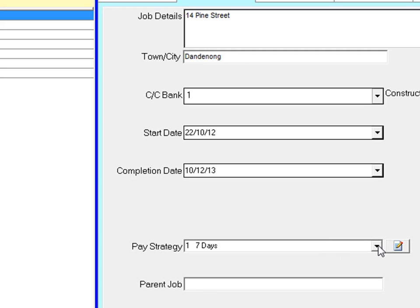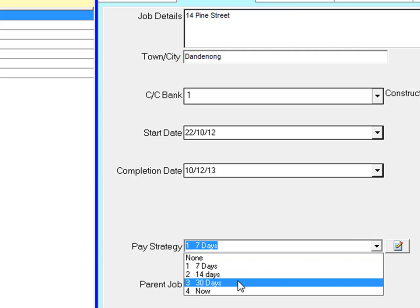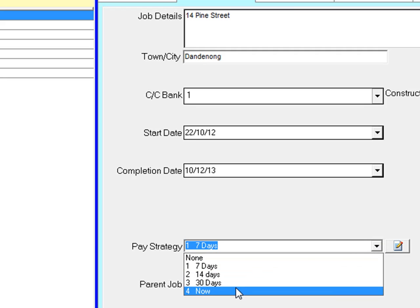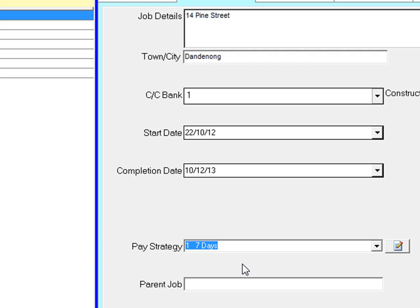Select the pay strategy. So when you send a progress claim to your client it will ask for payment as per the pay strategy set, in this case 7 days.